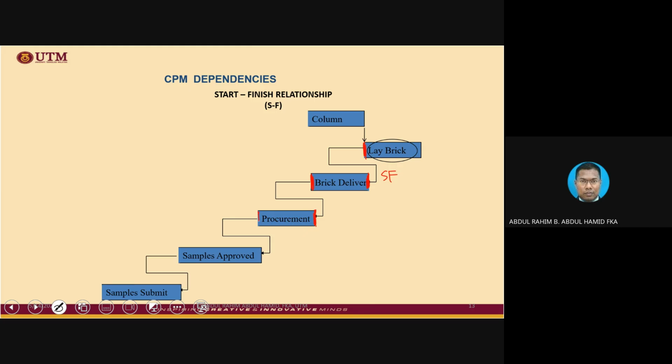The procurement can be started after sample being approved. If, for instance, the sample that we already sent to the consultant is not approved yet, then we cannot start the procurement. And then the last one, to start the sample approval process, of course, sample has to be submitted.